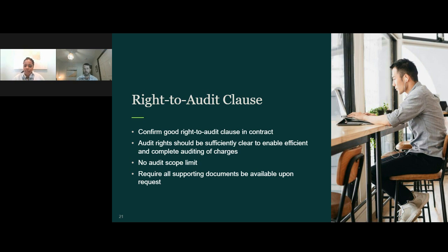so that when you say, yeah, we've received this billing, you're able to get the invoice, the proof of payment, the job cost reporting from the system of record, anything you would need within reason to say, hey, yeah, we were provided this billing. It is fully substantiated and compliant with the contract terms. Generally, we like this documentation available monthly when contractors submit. We often hear that it's a major burden to provide that level of detail on a monthly basis. However, for guarantee maximum price, that's what contractors are signing up for.